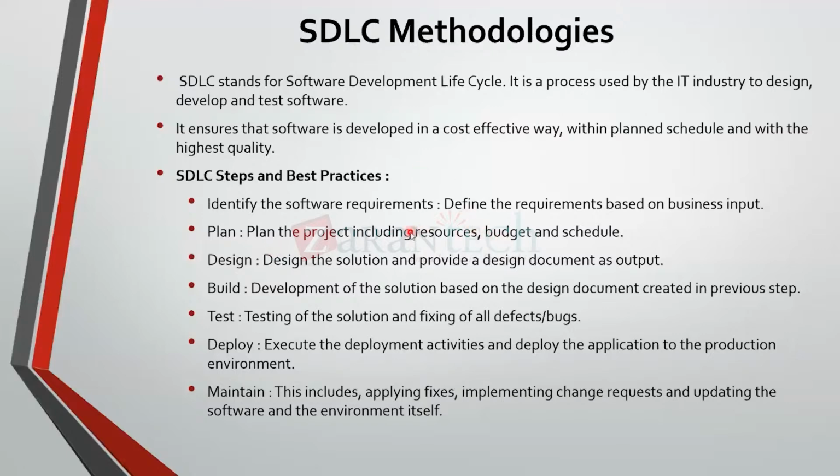Then you budget. Say for example, I got a budget of 30 lakhs. In this 30 lakhs, I need to give salary to the consultants, I need to buy the SAP software from SAP, I need to put up a server, I need to put a janitor. I need to account for all these things. So that is the budget that you have. And the schedule is, by December I should be live. So you have defined that you will start from today and end this by December. So this is the schedule that we have prepared.